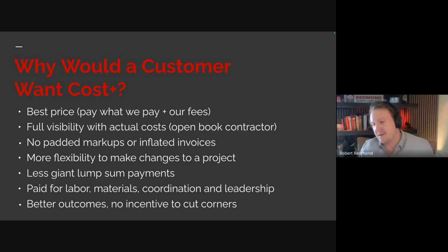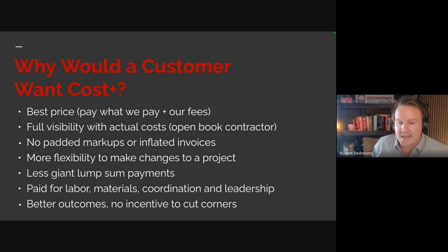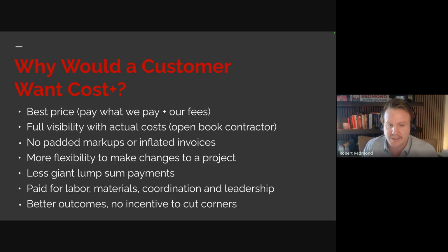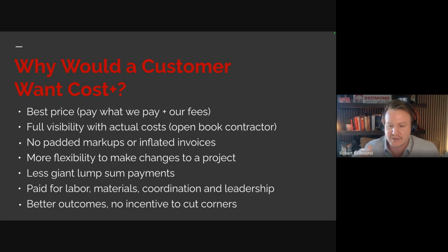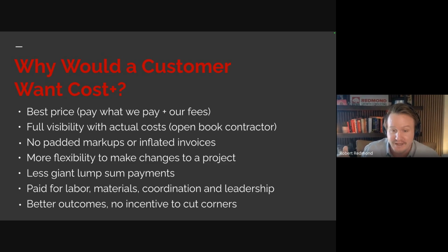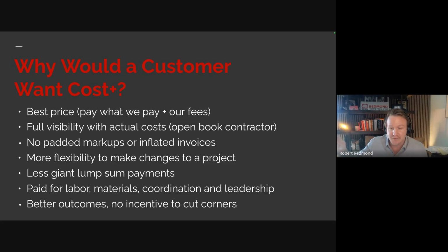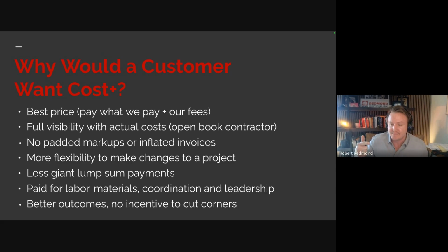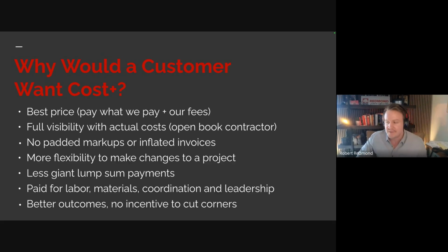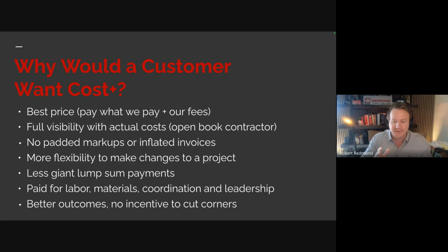And here's how you can frame this to people. You could say, hey, if a fixed price contractor is on your project and they begin to get close to their budget, there's two options that they have from there. They can either ask you for more money, which is what typically happens anyways with a fixed price contractor, or they could begin to cut corners. They could begin to try to reduce the amount of money that's being spent by having to come up with more creative ways of completing the job.